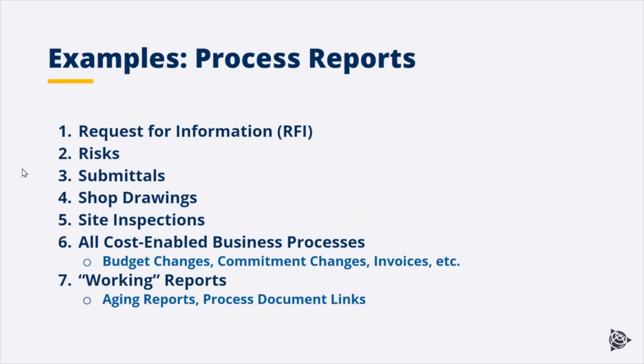And then, of course, an additional part of construction management is managing change. Managing change is really the central focus of construction project management, and managing change can be defined as a process. So you may have a process to do any budget changes that come up, or a process to modify a commitment, do a commitment change, or to approve an invoice. All of these can be defined within the system, and then of course you want to be able to report upon those various business processes that you've defined within your system.